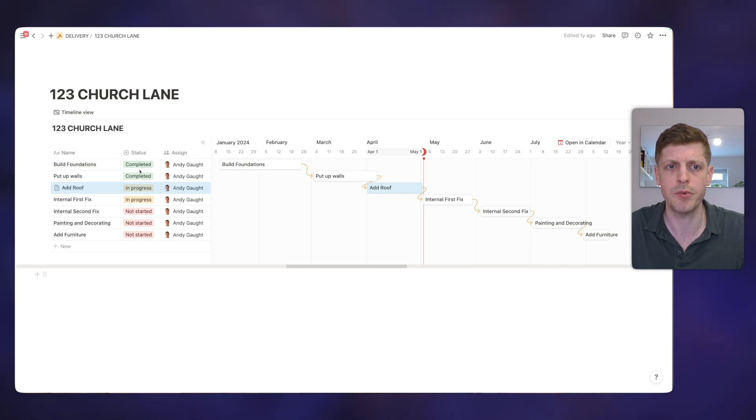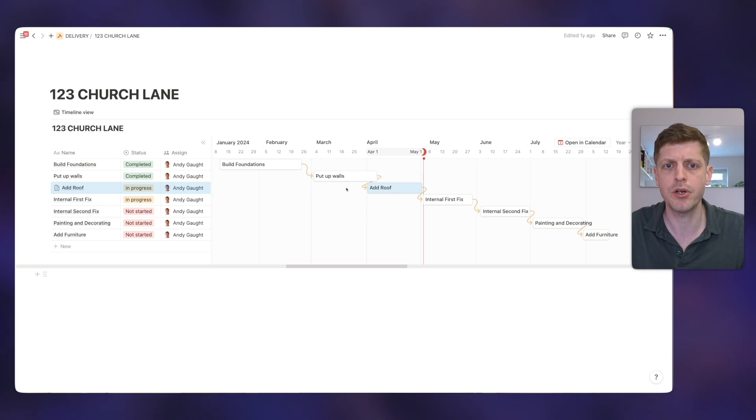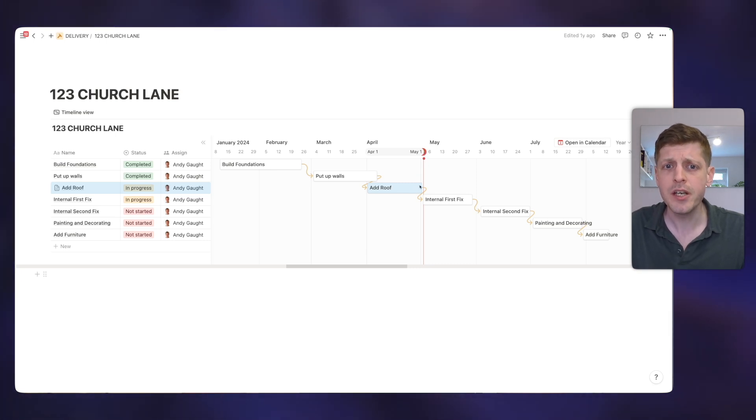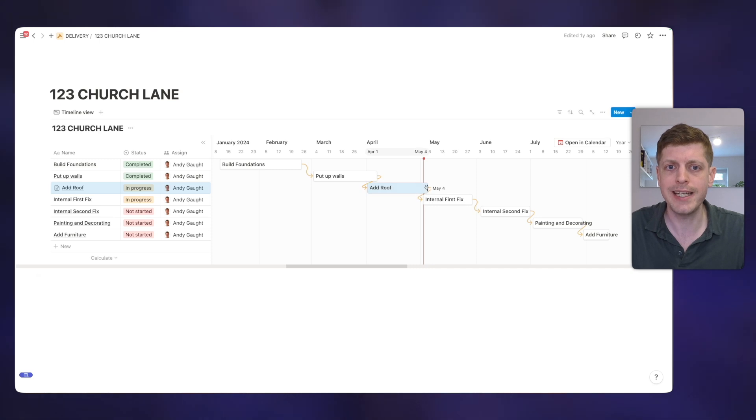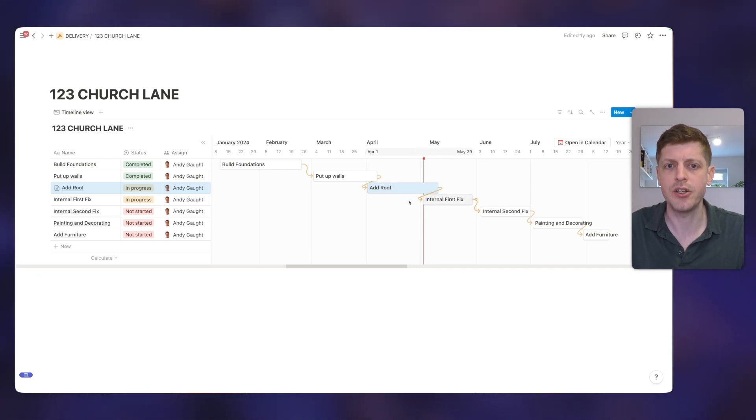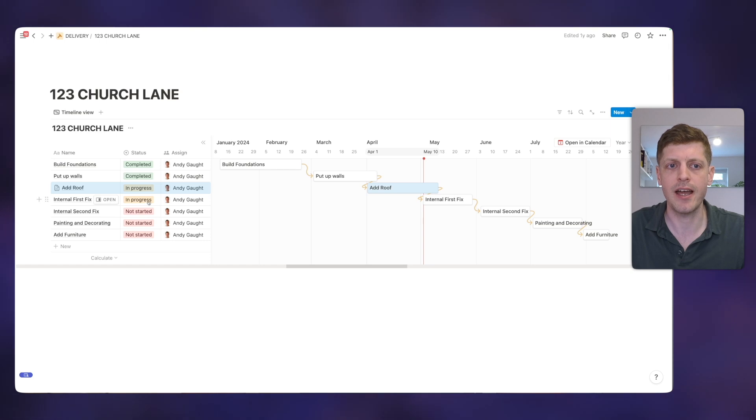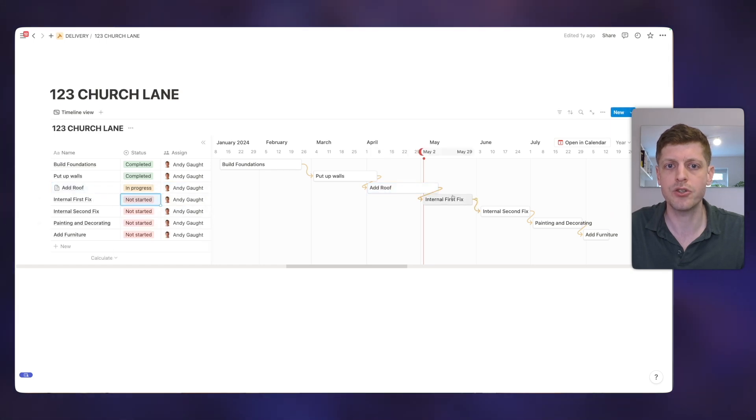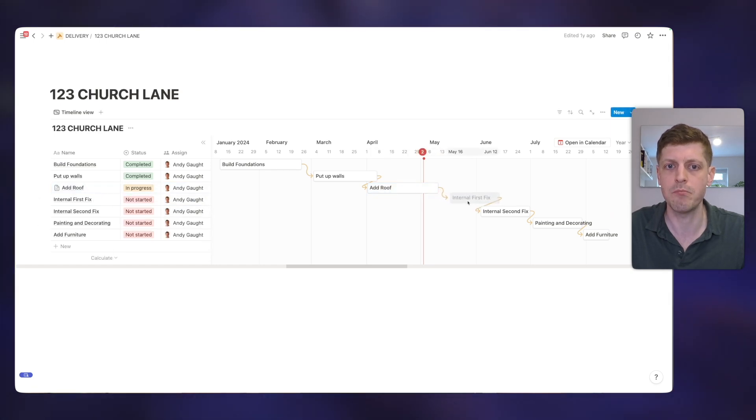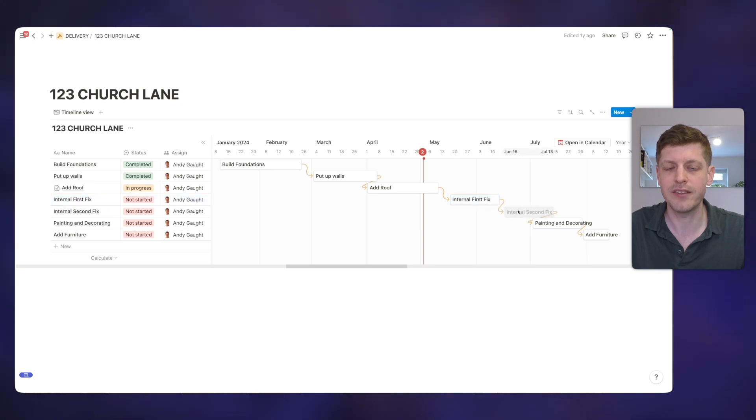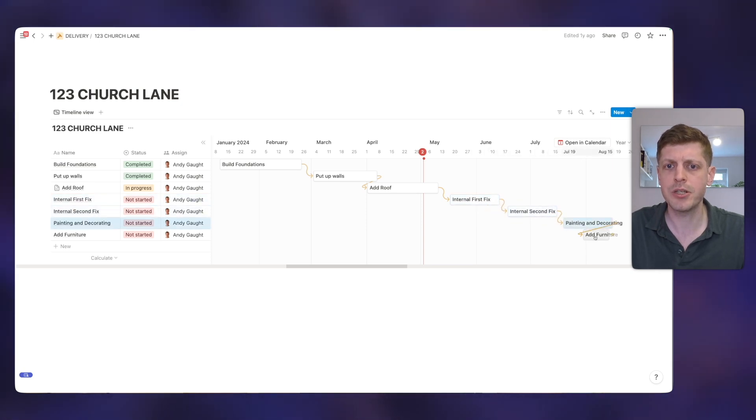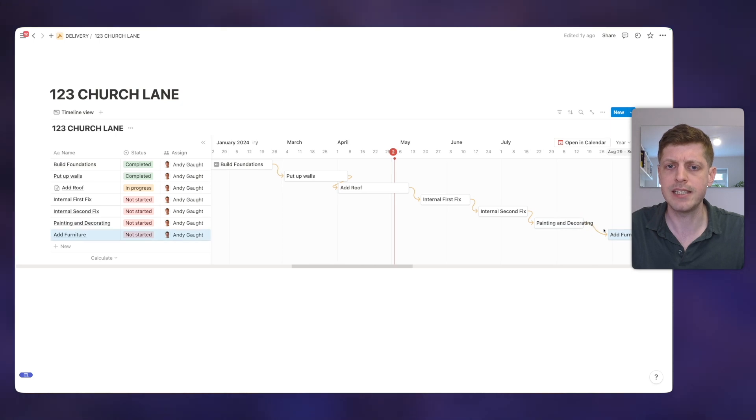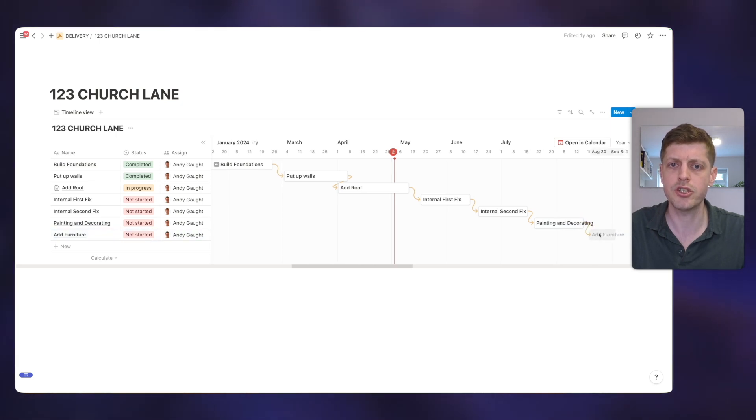Now, you can see here that the first two sections of this imaginary project have gone fine. So the foundations and the walls, those are both completed. But adding the roof is still in progress. And we're currently here at the beginning of May. So this is where we can go and manage our timeline by easily going and extending out some dates. And you can see that our internal first fix is actually not in progress. That's not started yet. And we can then start going and moving things to reflect the delay in the timeline. So in terms of managing projects, this makes it really, really easy for keeping things on track or going and shifting around your schedule.